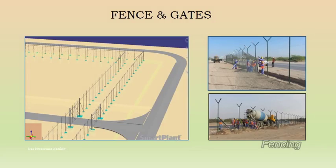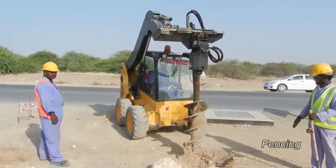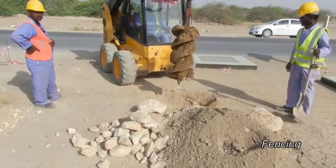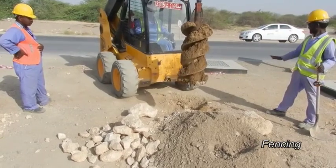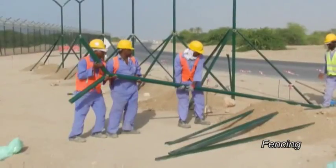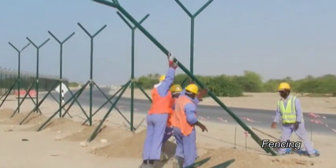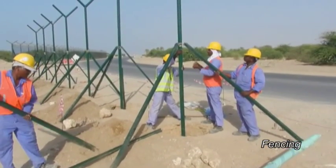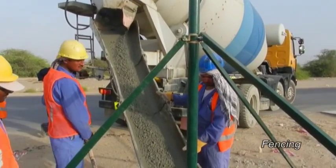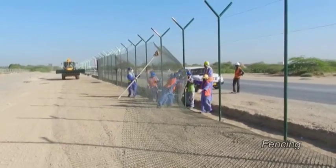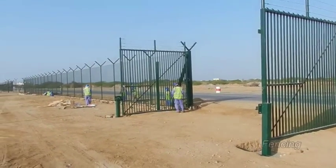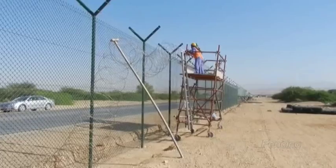Fencing. The construction sequence: set out line and level; check for existing underground services; clear and grade ground; excavation for fence post foundations; erection of posts; place in situ concrete around posts; installation of fence wire system — line wire, chain link, barbed wire, razor concertina wire; installation of gates; pour concrete ground beam.